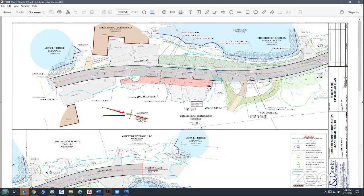Before they do their job, there's a number of specific blasting rules and requirements governed by the state of Maine that they would have to follow. It would be a certified blaster that would do this. They have to inventory the houses. A lot of times they come into the houses, they document the foundations, they take pictures, they would document the well location. So it would be on them to make sure they don't impact those things, and their insurance and their procedural components would take care of that and give us that assurance that they wouldn't damage them.